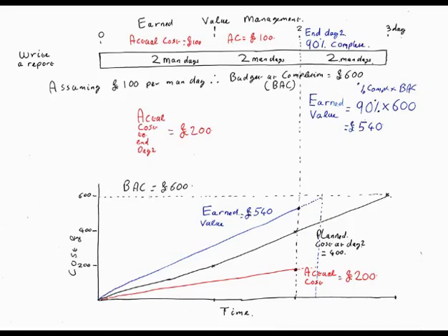So what this tells me is that I'm ahead of plan and significantly underspent. Yes, I should have done £400. Okay. I've delivered 540, and I've only spent 200 to achieve it. That's right. It's rubbish. Well, it depends what your success criteria are and what's important to you. It's fantastic then. It's neither fantastic or rubbish. It depends. Well, it's not perfect. Well, it depends. If your aim is to maximise your profit.